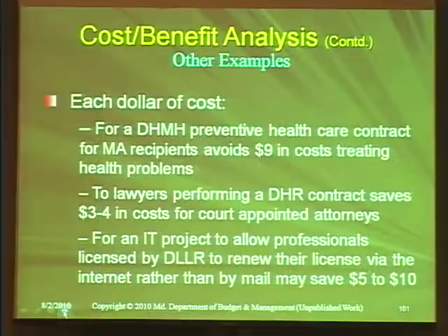And what they found out was that the contracts they awarded to attorneys through a competitive process were about 1/3 to 1/4 the cost per hour of the attorneys that were simply appointed by the courts. So after they did this as a pilot project to see, will it pay to go out and do this type of procurement? Will we get lawyers that come back and compete, and what kind of prices will they charge? On a pilot basis, they found that they were saving 3/4, almost, of the expense of what they were paying for the court-appointed attorneys.